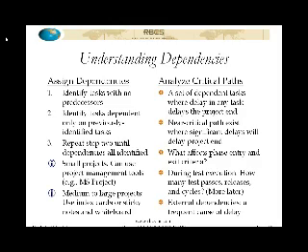And in order to determine the dependencies, what we will want to do is start by looking at the tasks that have no predecessors, the ones that we can start immediately upon the approval of the estimate. Imagine that we have all of our tasks in a list or in a stack of note cards, index cards or something like that.